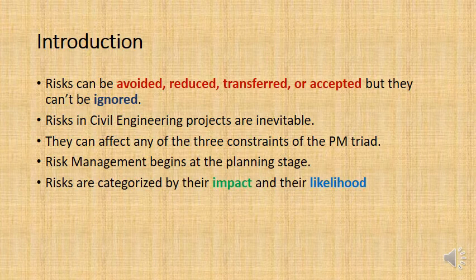Other risks may actually have smaller impacts but higher likelihoods. An example would be something like, okay, the chief engineer gets sick, he has the cold for a week and he can't work, and that delays the delivery of the design work by 1 week. Well, the likelihood of that is quite high.